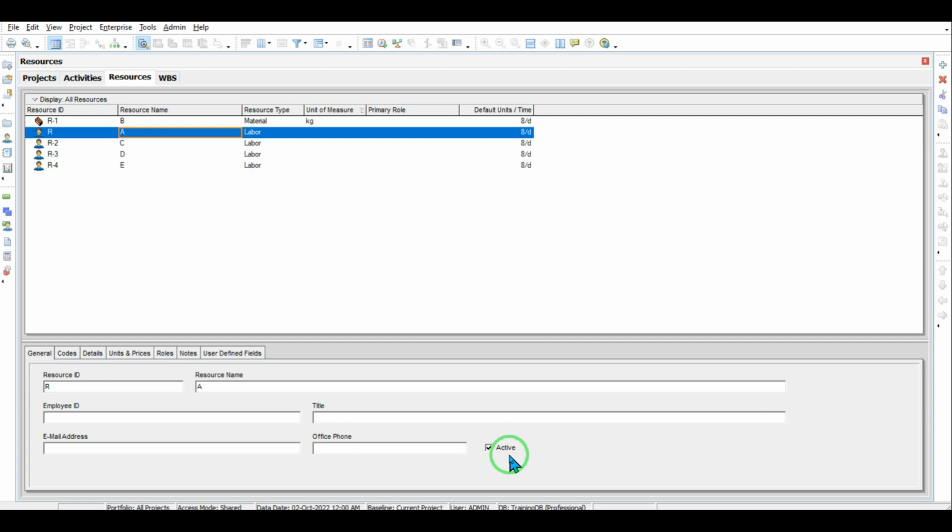If in an exceptional circumstance in your project, a resource is stopped and you do not have any access to it, you can change the status of this resource to inactive by checking this icon, in order to alert the activities that we do not have this resource currently. However, in the usual condition, we keep it active.